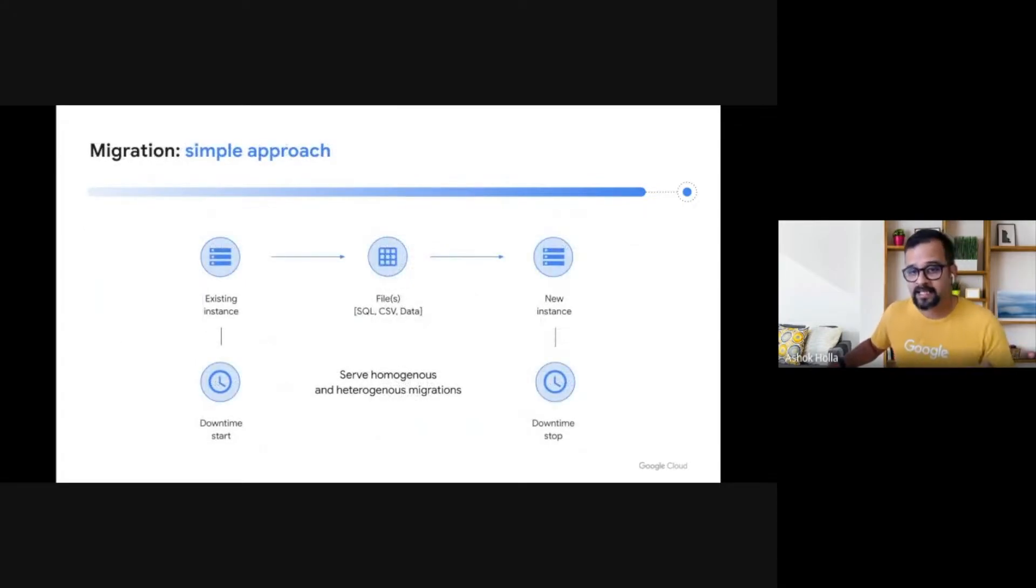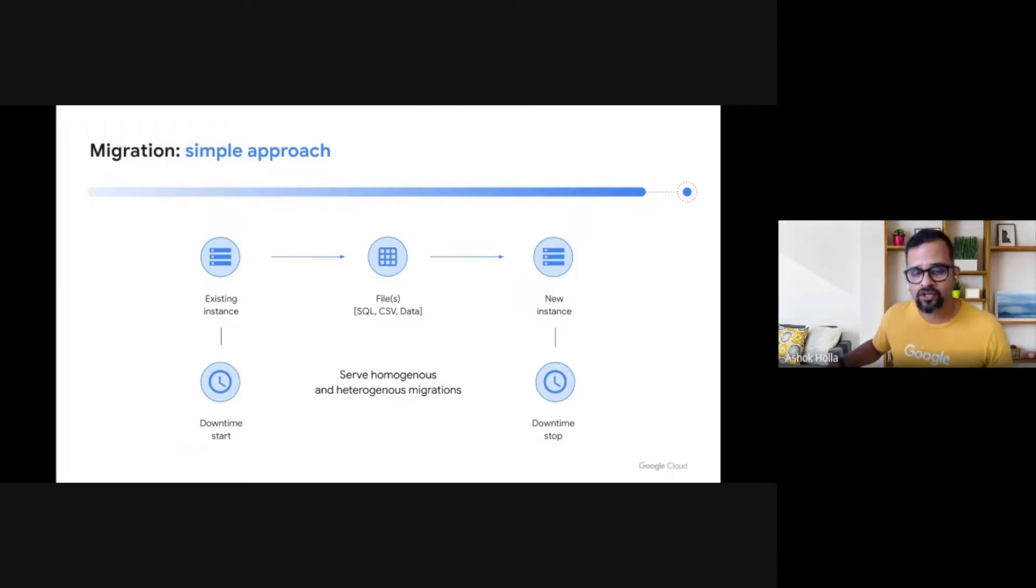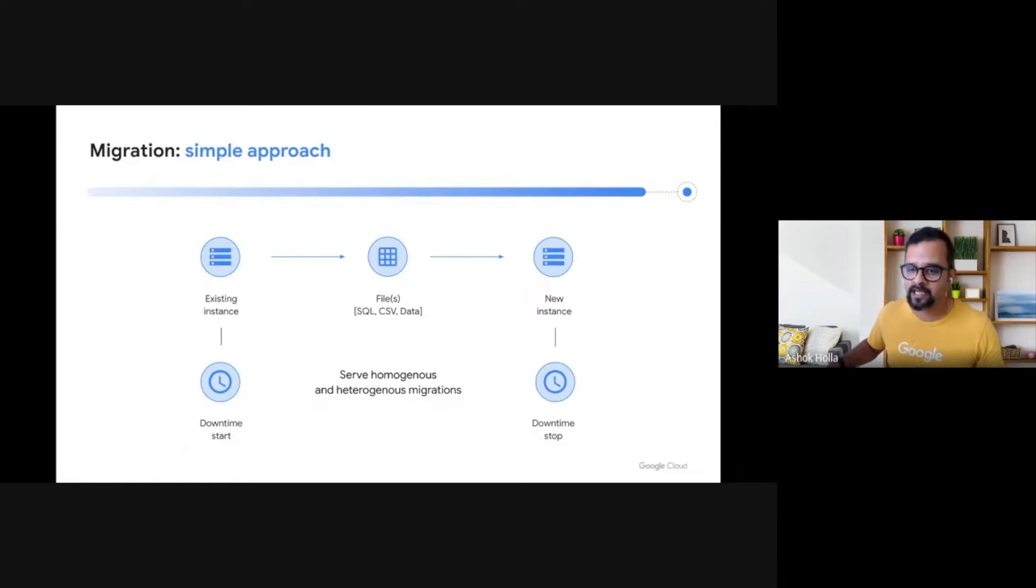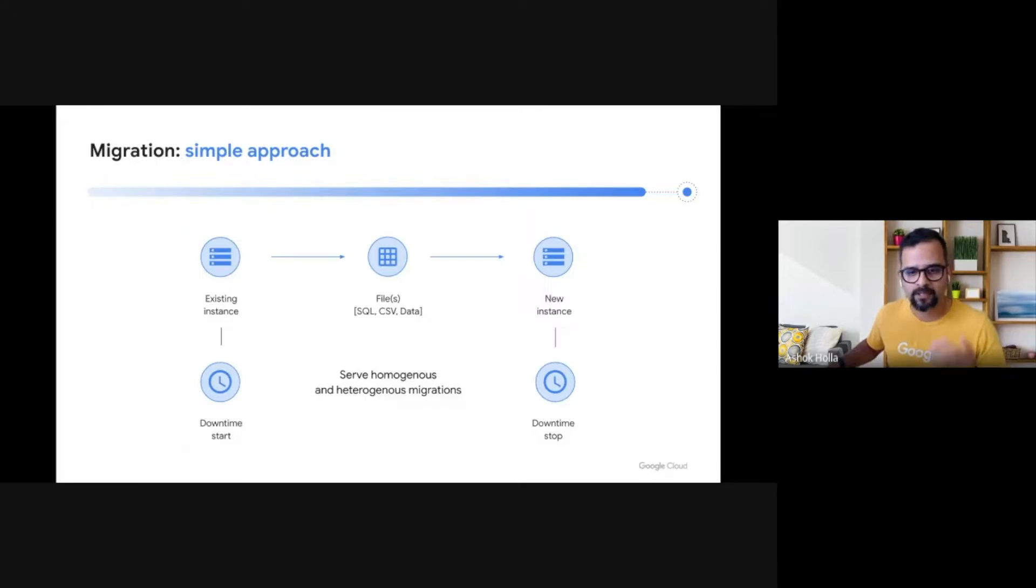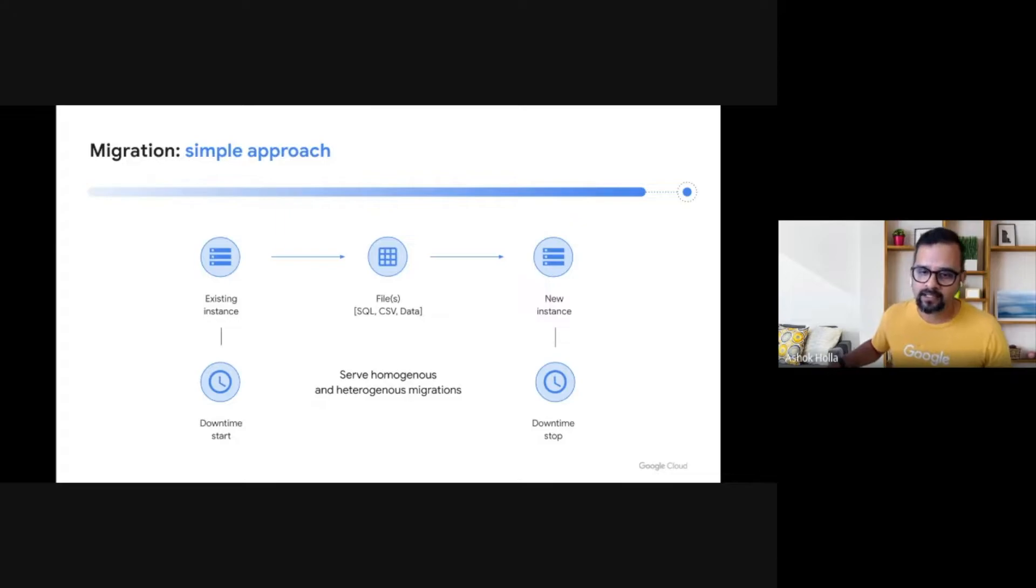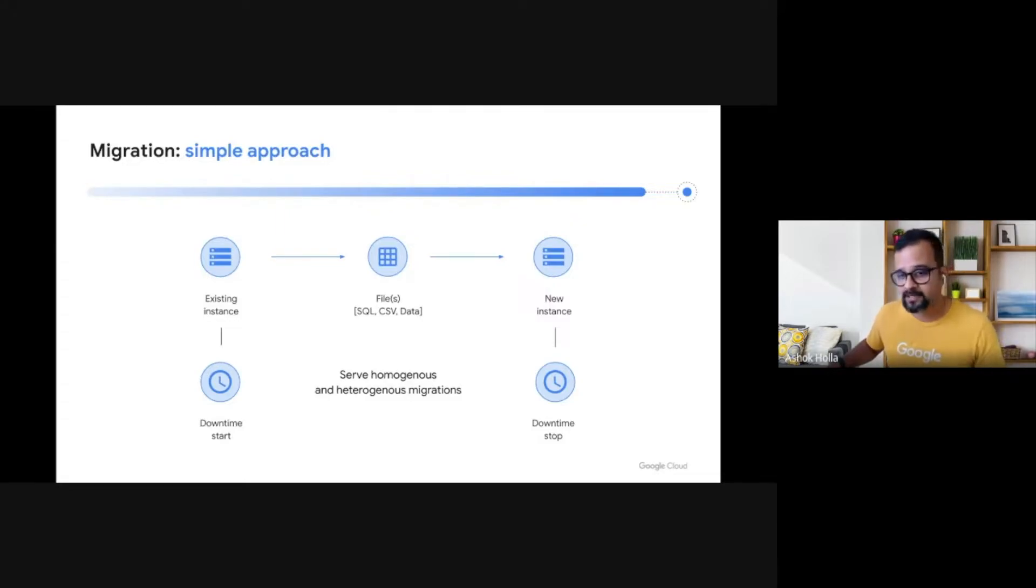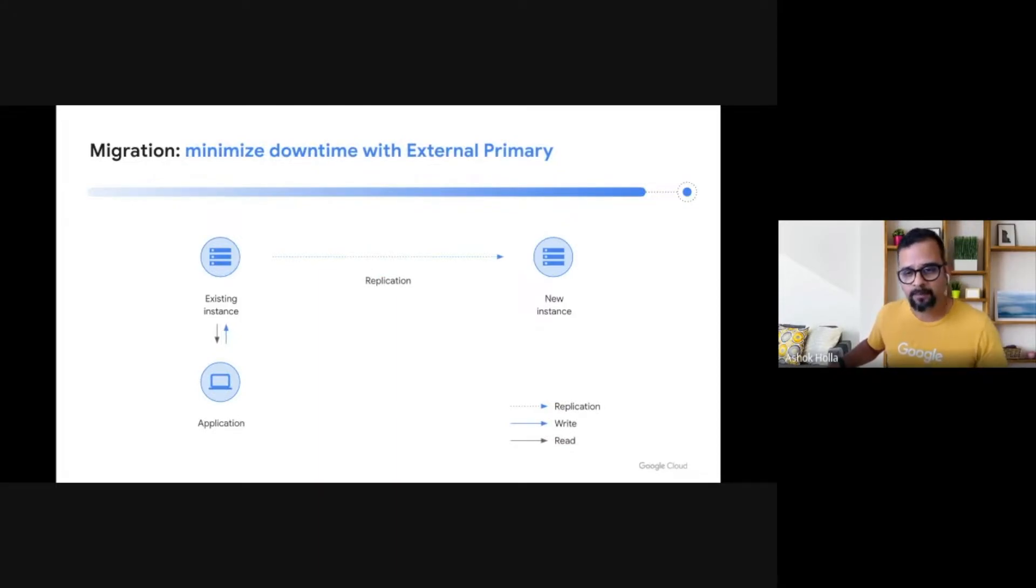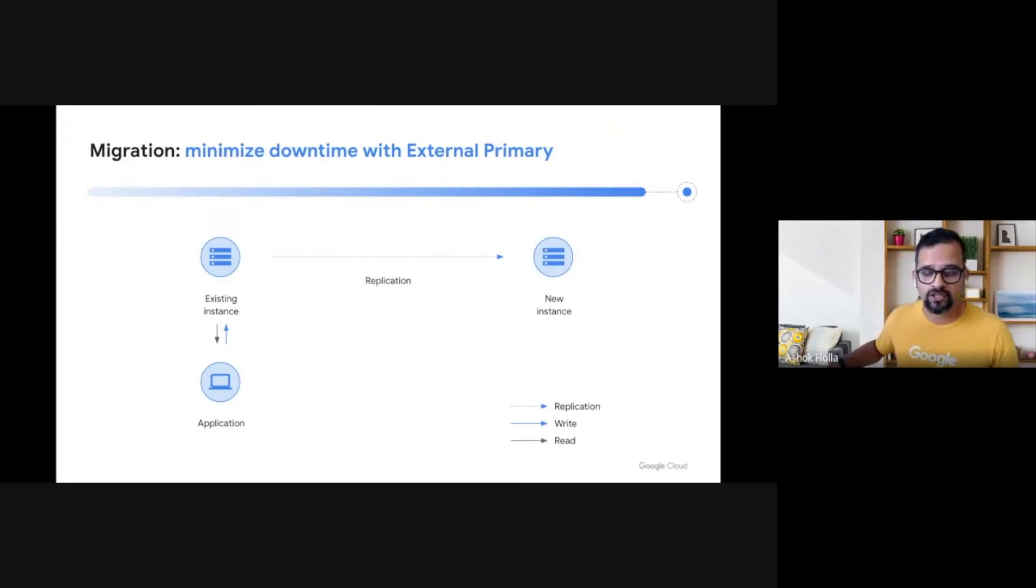The next critical decision point is a migration approach, which is determined based on the application and database criticality and its tolerance to downtime. An application or database with high tolerance for downtime can choose to use the simple approach of turning off the source, taking backup, restoring in the cloud, and turning the new database back on. This is simple, yet has higher downtime and can be a strategy for less critical applications and databases. For more critical databases, which have very low tolerance for downtime, the simple approach does not work. Maybe migration via replication is a better methodology.